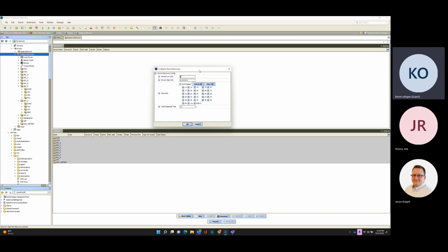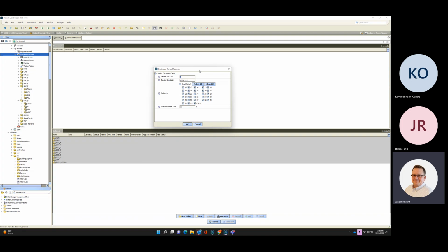Does that make sense? Yeah, let me check on that. Okay. I'll have Ty reach out to you about getting some of those from you. Perfect. And then that way we don't have a situation where SCC is trying to commission stuff and everything goes down. Because they'll get over there and they do the best they can, and they'll start changing stuff out and not tell anybody. And then SCC might be in the middle of going through a section, and then we lose a router or two, and it creates a whole storm of nobody knowing what's going on. And it's as simple as a cable just needs to be moved to this port.